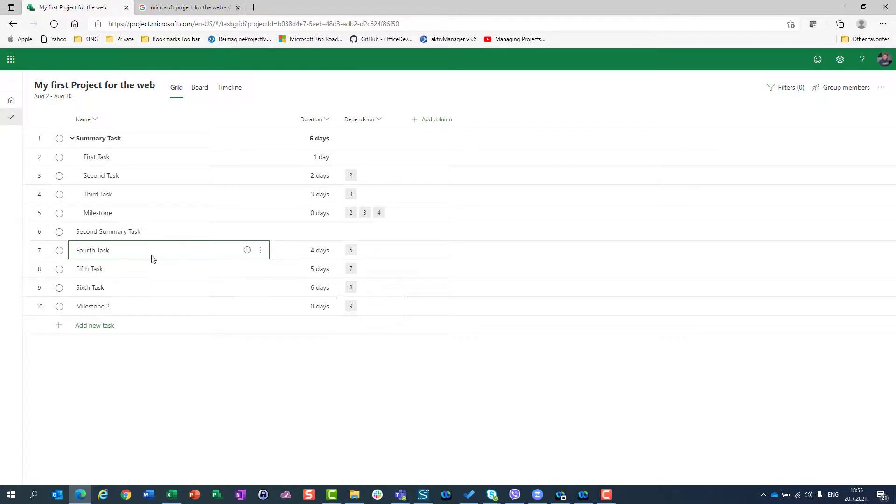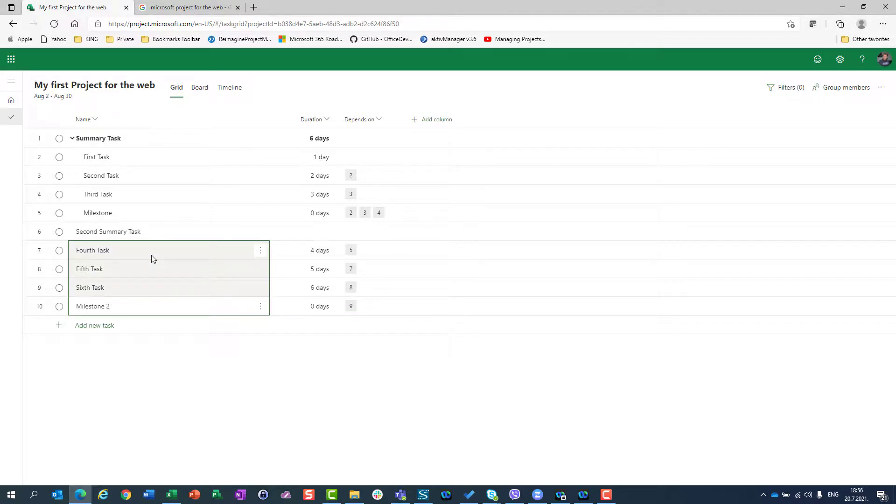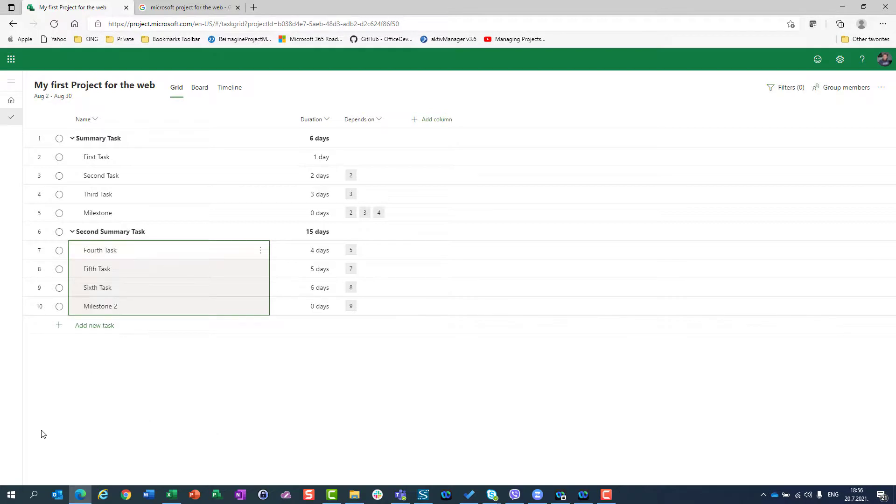Then milestone should be done and the whole this area should be finished after sixth task is done. So, once again, I will select all those tasks, right click, make subtask and that's it.